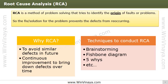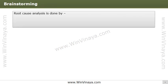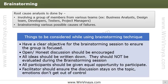Starting with the brainstorming technique: members from different groups — for example, business analysts, design team, developers, testers, and project managers — come together to examine the problem and brainstorm all possible causes of the failure. The moderator or facilitator will then process the ideas and note down everything that was discussed, to arrive at the real root cause.